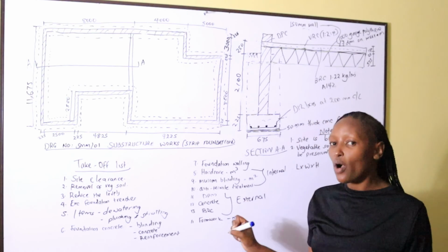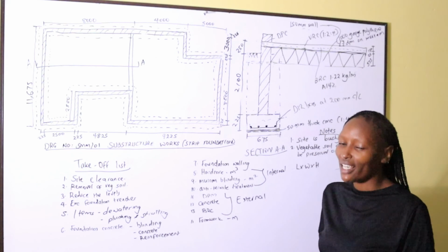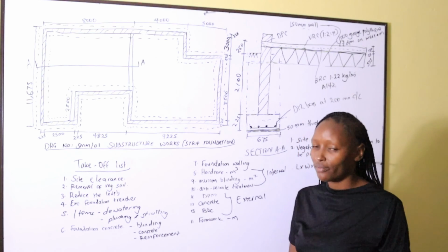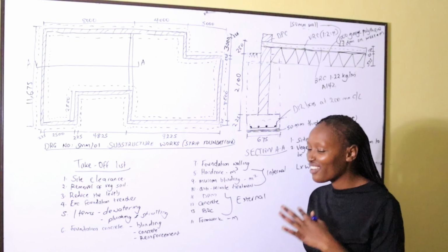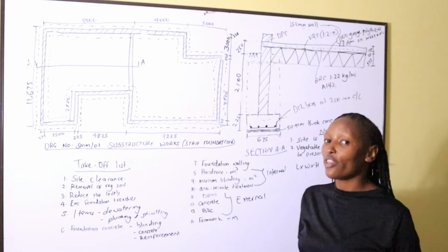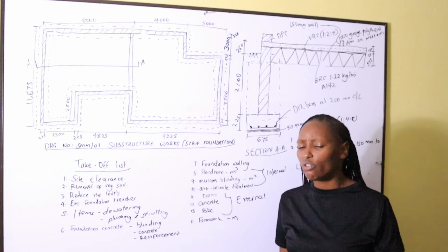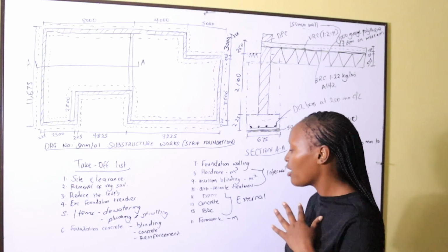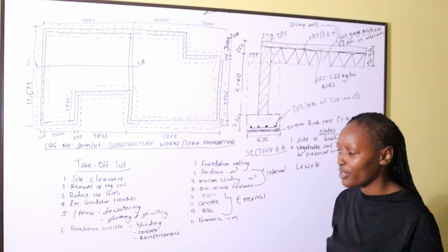And the formwork, we usually find the perimeter of the external of the wall. The external perimeter of the building is the length of the formwork. I hope that is clear. I'm just saying points. The length of the formwork for the concrete that supports the overset concrete, we shall just need to calculate the external perimeter of the wall, because the formwork is placed on the external perimeter of the wall.